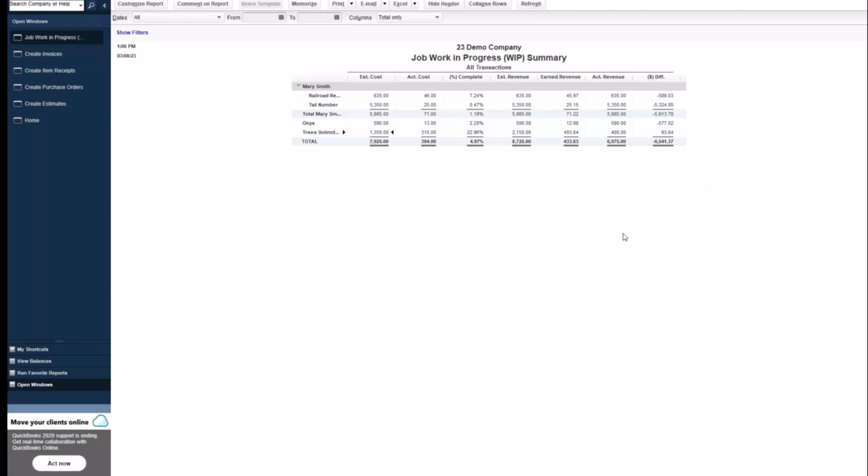Okay. One key difference, and I cannot emphasize this enough: when we do over/under billings, on our balance sheet there's an over/under billings asset and an over/under billings liability. The other side of that entry is going to be sales or income of some sort. The total number on this WIP summary, this $6,541, is the balance that should be on that balance sheet account. It is not the number that you make the entry for. Okay, that is very, very important.